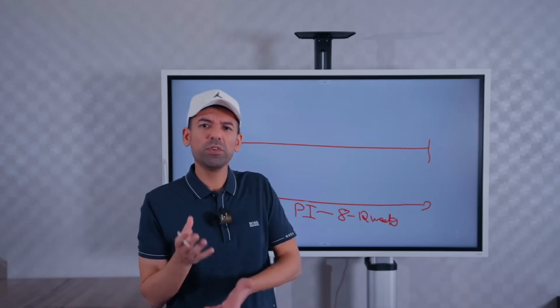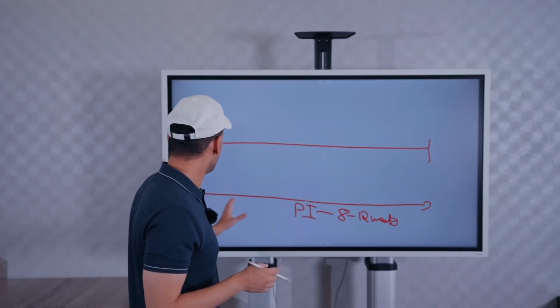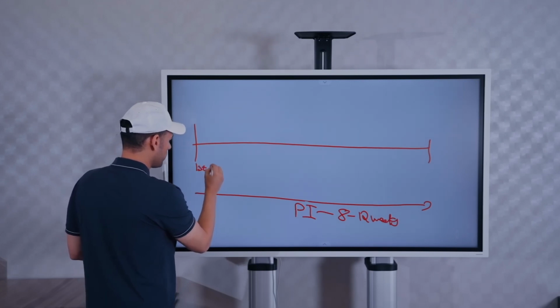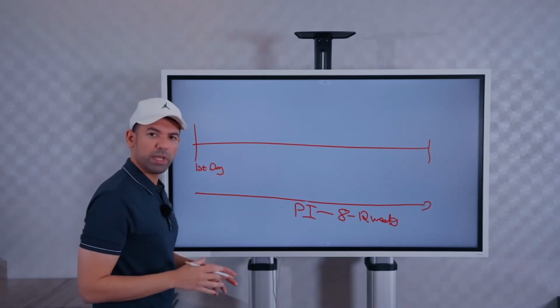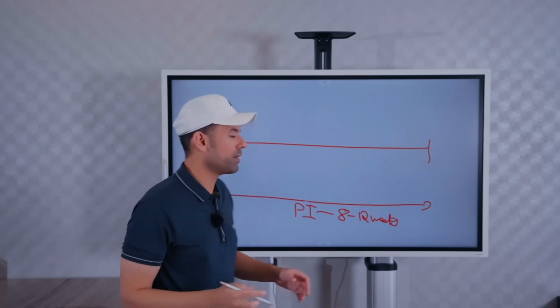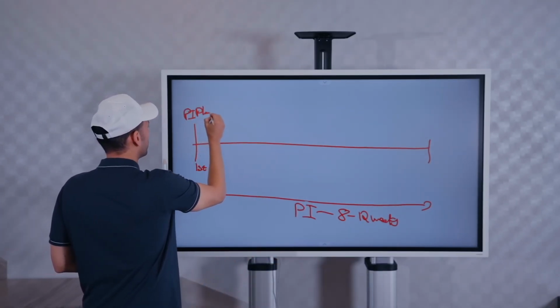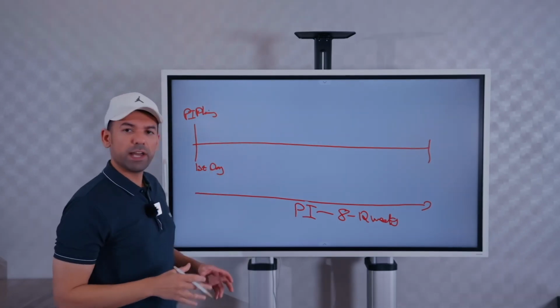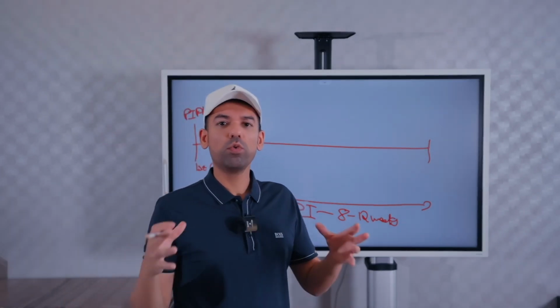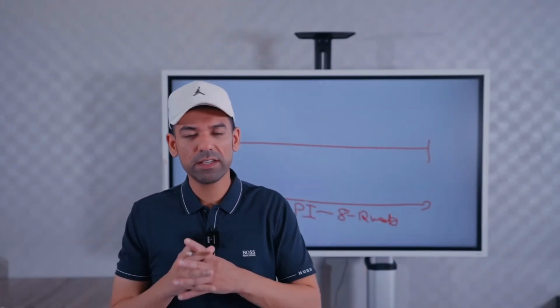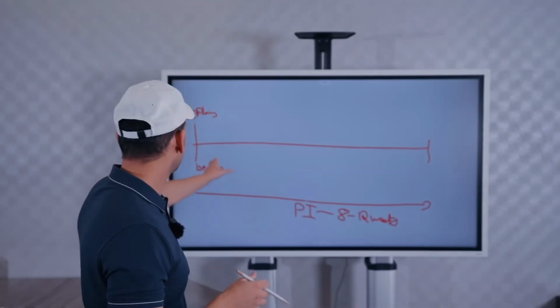Three months, loosely speaking. So on the first day, we have something called PI planning. During PI planning, all the teams, the 5 teams, and all the stakeholders get together and they plan. It's a 2-day workshop.